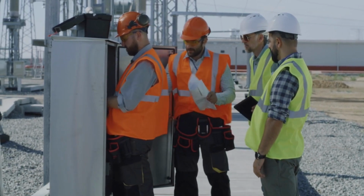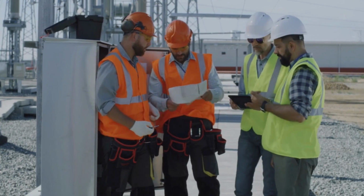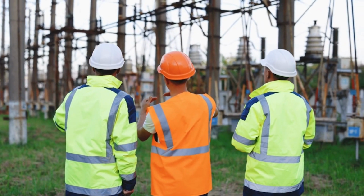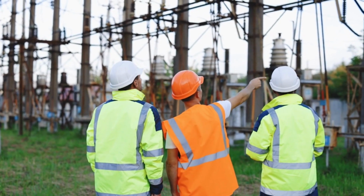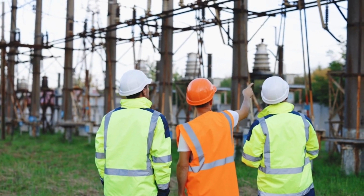The commissioning team mobilizes to site and tries to figure out everything on the fly. No specialized skill sets or experienced commissioning team members. Commissioning is complex, and it's not possible to be an expert on every piece of equipment. Process experts or equipment experts will be required to participate in various stages of commissioning to ensure that the proper aspects are being considered. It is not appropriate to randomly assign junior team members to go figure this stuff out on their own without providing the guidance and support they need to be successful.